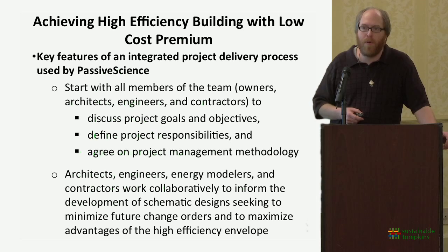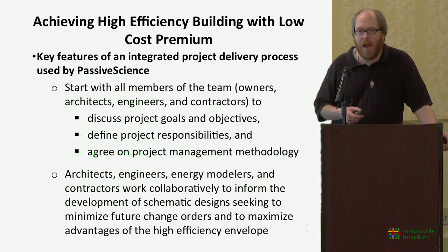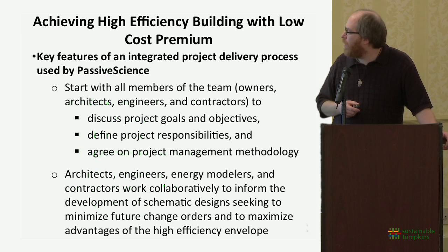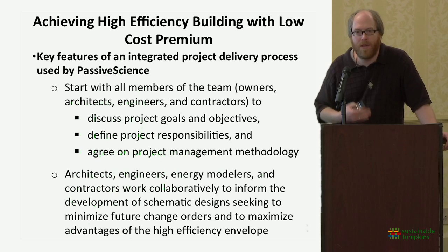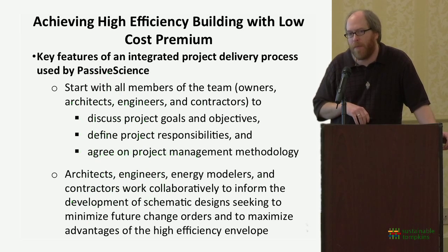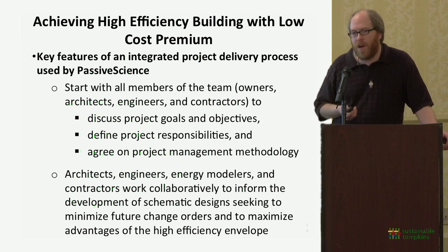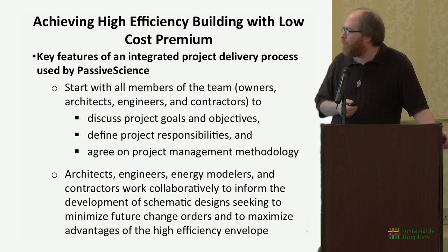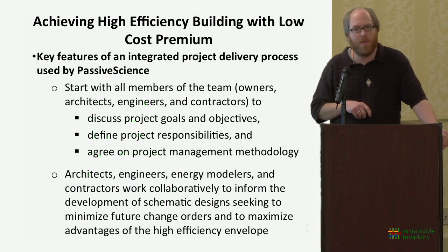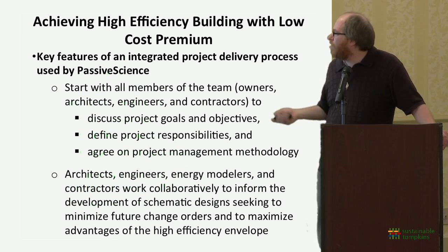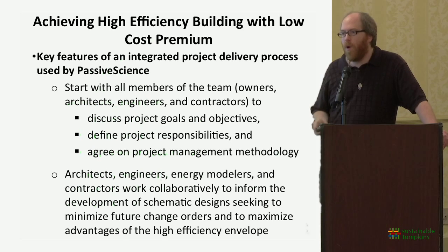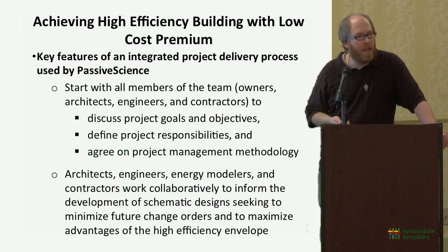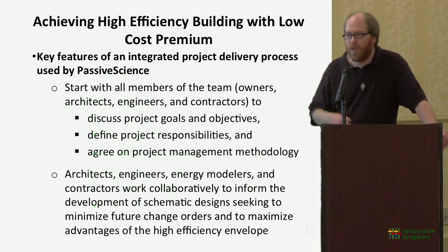And one of the things that they promote is what they call this integrated design process. One of the things that they really stress is that if you want to build high efficiency systems that are going to meet these kind of cost parities, you really have to start from the beginning. So they have this 5-step process, and I thought it was worth just running through some of the highlights of it. What they start with is to get everyone in the room at the same time, to get the owner, the architects, the engineers, get everybody together at the beginning and agree on what the goals are, what the budget is, what the decision-making process is going to be, who's responsible for what.